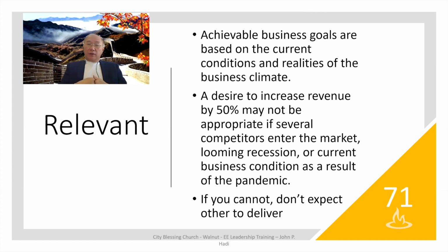If you cannot, don't expect others to deliver. If you cannot produce what you ask people to do, then don't expect others to deliver. It's not relevant. It's not fair, right? I told my team, if I can do certain information in, let's say, one day, normally what I do when I assign it to my staff is give them 50% more or double the time. If it takes me one day, I give them 2 days. If they can come in early, that's good. That means he or she is promotable.